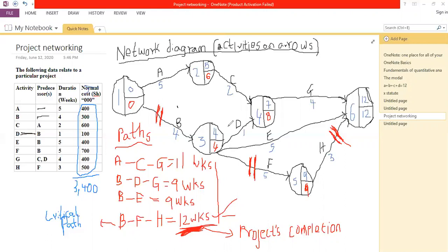Therefore, all the activities we call critical, the expectation of the floats, if they were to be computed, they should be turning up to be zeros, yeah? But for the non-critical activities, you may find that space-time as an amount actually defined, because we can allow for a delay for such an activity.